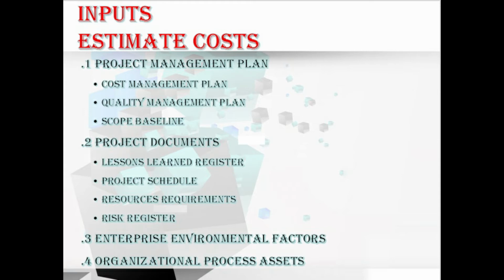Here we need to note one point: the reason behind requiring a schedule before coming up with a budget is timing. When you buy something, timing may affect its cost. Let's explain with an example. The price of equipment or material may vary due to factors such as availability, seasonal pricing fluctuations, or any new model releases in the market, and it also relates to the cost of human resources. That is, based on availability, cost may vary. So to overcome these types of issues, we have to develop a time-phased spending plan to monitor and control the project expenditures. Hope you clearly understand this important input.